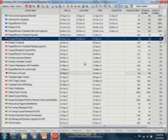I mean, you can certainly set up a filter to find activities that are supposed to be updated within a certain time period. And so you can do like I'll create like a 1 month look ahead or a 2 week look ahead that'll show you all activities that are supposed to take place within a certain time period, so you know which ones that you're supposed to update.